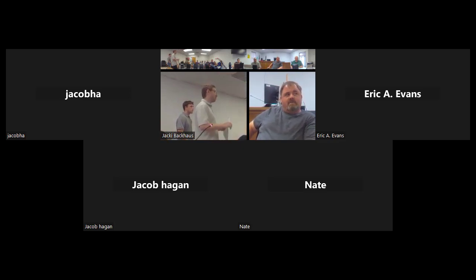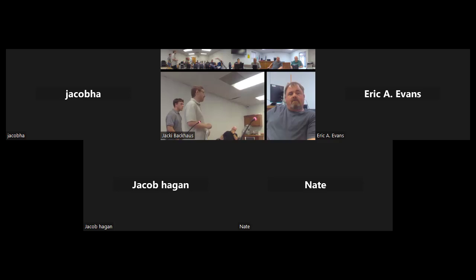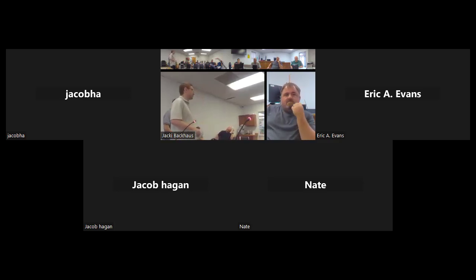Whichever one you choose, we have to touch it up, write up specs, and make it ready for bids. If we have to put all 4 options out for bids, there's more engineering costs, but that's about the only issue.